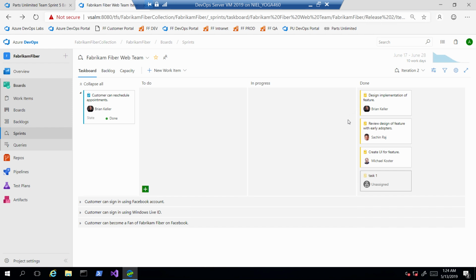The idea behind these things are that the tasks, just like your user stories, they get broken down into the granularity of being able to be completed in a sprint or an iteration. If it's bigger than that, you break it down into smaller stories. And then you move the story into a feature or an epic, and then you break it down. The tasks, same approach. You want to keep it as granular as possible, generally speaking in under a day. So it needs to be small, granular, add a table, add a view, add a field to a view, that kind of stuff. And the reason for that is so that it is trackable.